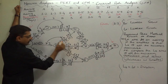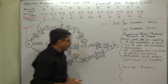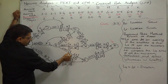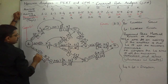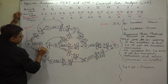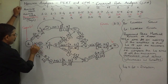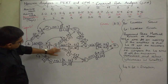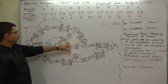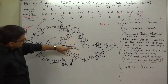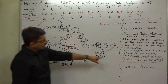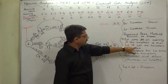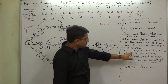The latest start times of the three successor activities of B are 7, 8, and 12. Compare them and select whichever is smallest - that is 7. So 7 becomes the latest finish time of B, and 7 minus 7 = 0 becomes the latest start time of B. The rule is: the latest finish time for an activity is the smallest of the latest start times of all its successor activities.